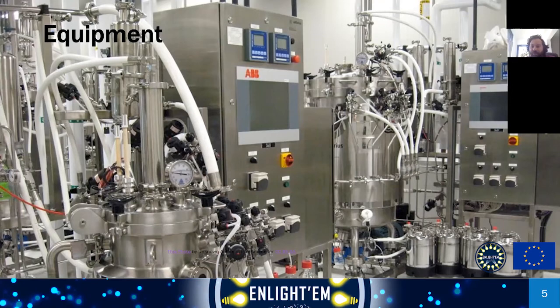Research who are potential users of that equipment, research when that equipment is available, is there any maintenance period coming up for it, or so on, so you don't get caught out when you really need to use that equipment. And also very important is always have a plan B if your research project is heavily based on experimentation, or equipment plays a pivotal role there, in order to be able to account for things like equipment failure, or anything similar of that sort.